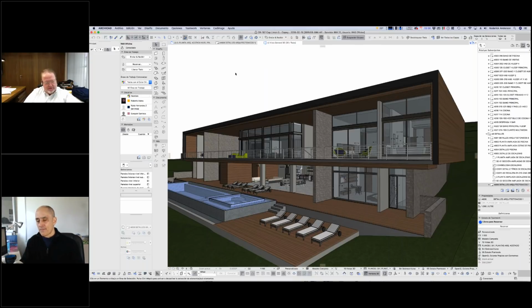So we were hired at the end of March 2017. We started work on the 6 big designs at that time, and from, let's say, mid-April 2017 to last week, when we delivered the whole 6 sets of completely developed construction drawings. We developed the 6 different designs with full architecture, full interiors, full interior drawings, engineering packages, in completely finished sets of construction documents for all 6. So you could say that's a process of roughly 8 to 9 months.